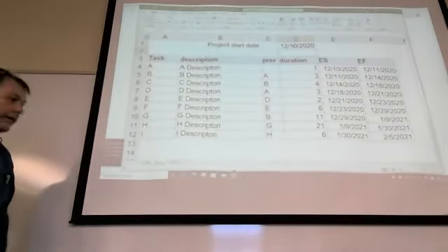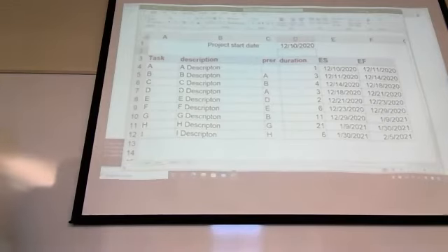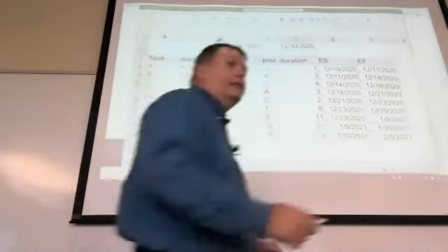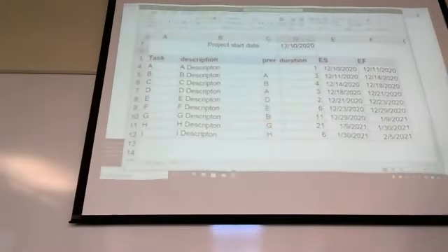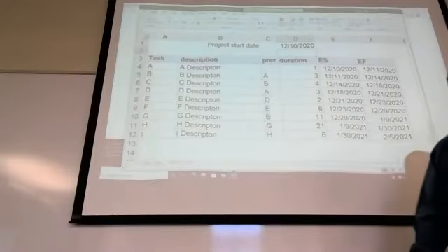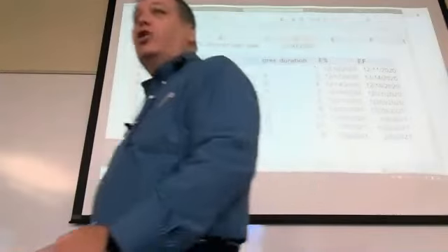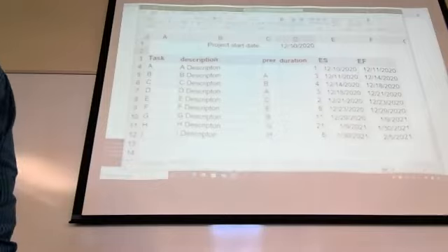So what's our critical path here? We know critical path has got to have A in it, right? That's the first one. What other ones don't have or need, well, what comes off of A? So we know B comes off of A, and D comes off of A, right? So we have two branches off of A. Question is, which branch is faster or which one's longer? The longer one of the two is the one that's the critical path.